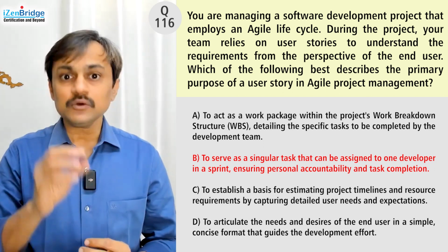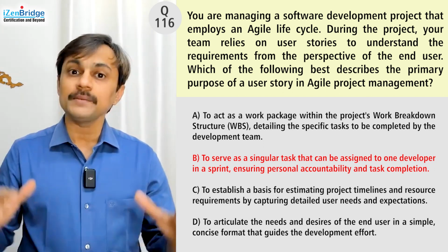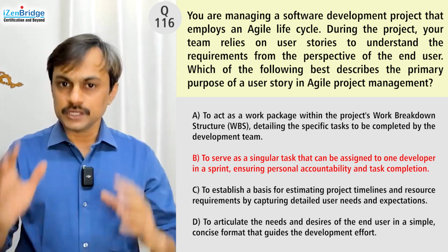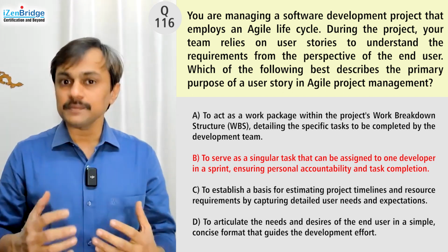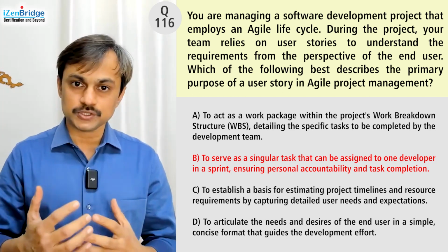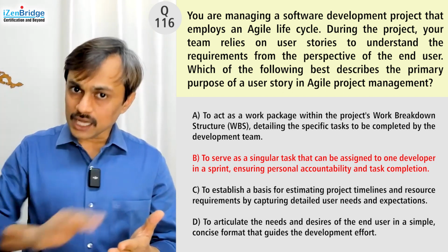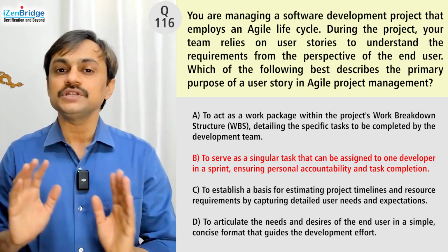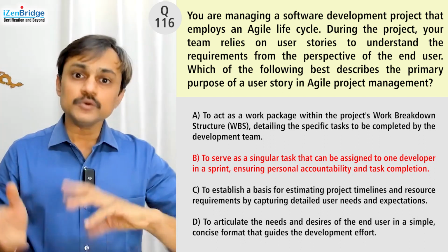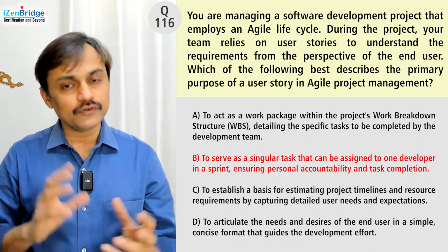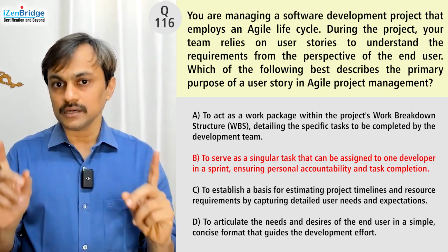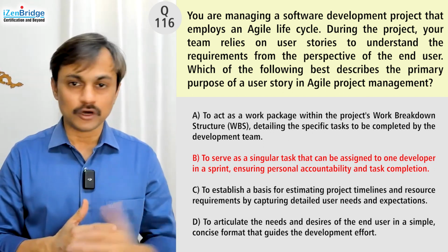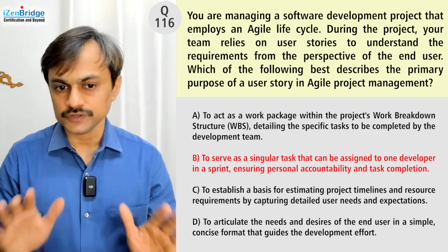There is a possibility one user story may be collaborated on by multiple people to get it done. There is also a possibility that in a sprint planning meeting, in an iteration planning meeting, we collaborate around a user story and create fine-grained tasks under it before we execute it in a given sprint. So saying a user story is a task meant for assigning to one individual is a little bit doubtful. So let's see if we have a better option.